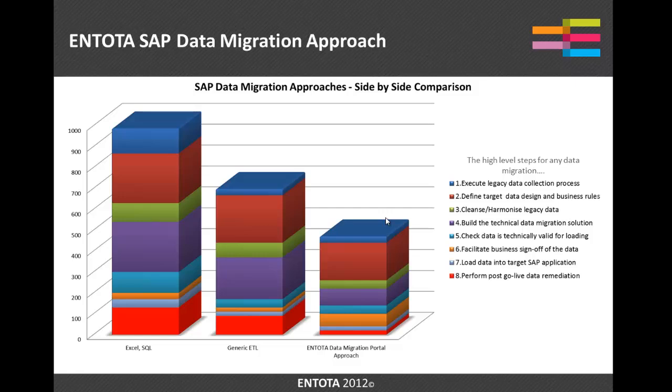The other area that we see general or major savings around will be in the post-go live data remediation. We've certainly seen with clients, where we've been involved, that they've had real struggles having to remediate data post-go live because they didn't spend enough time on the business rules, the business process readiness of the data, rather than just the technical validity of the data. And it's very easy when you're just using tools like LSMW on its own and these load tools to negate the fact you don't find out where the data issues are until you're actually attempting the load processes.